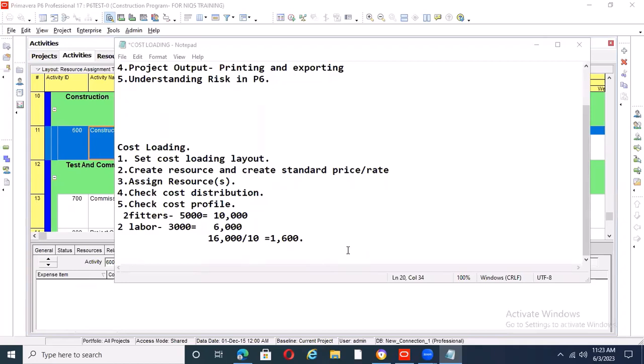But usually it's easier to detail your activities in P6 than on the BOQ. You know, in our description on the BOQ, you have a lot of activities that are like your excavation. You can describe all of it on one activity description and put your quantity, units, and price to it. But in planning, you can't do that. You have to break it down one after the other.